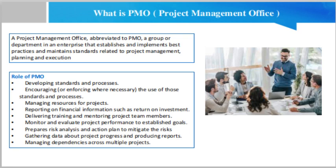The Portfolio Analyst facilitates the development and ongoing management of an optimized portfolio, ensuring senior management decisions lead to the fulfillment of strategic objectives through delivery of projects. The Project Specialist plays a proactive role in the promotion of project management methods and standards, implementation of good project management practice, and monitoring of certain projects. The Project Officer improves the planning and delivery process by collecting and maintaining data in a consistent form.